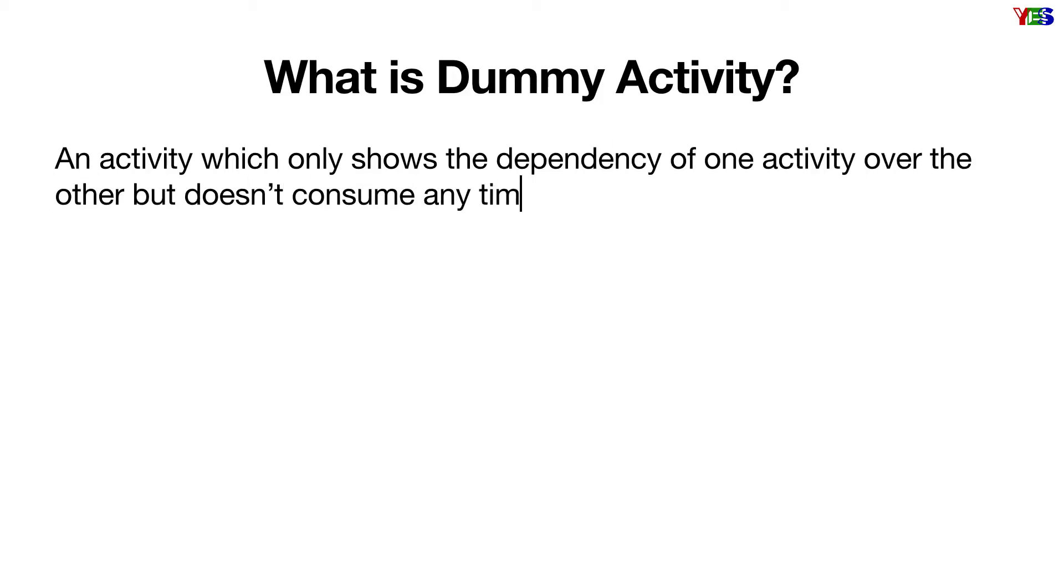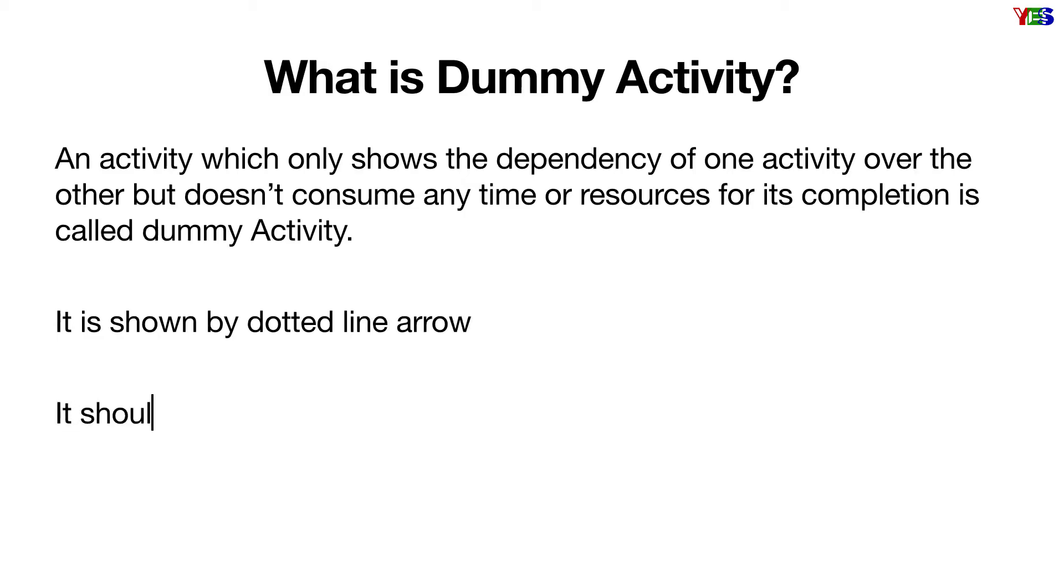any time or resources for its completion is called dummy activity. In the network diagram it is shown by dotted line arrow, and one of the rules of network diagram is it should only be used if it is very necessary.